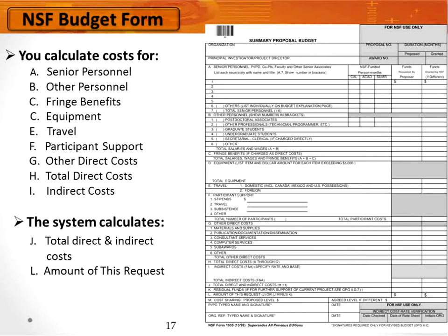On this slide, you can see the actual budget form. On the left, the NSF budget categories are listed. This list is important. We strongly recommend that you use these categories in the alphabetical order presented as an organizing tool for your budget justification. Both reviewers and program officers will appreciate a budget that is organized this way. A little later, I'll show you an example of how to do this.